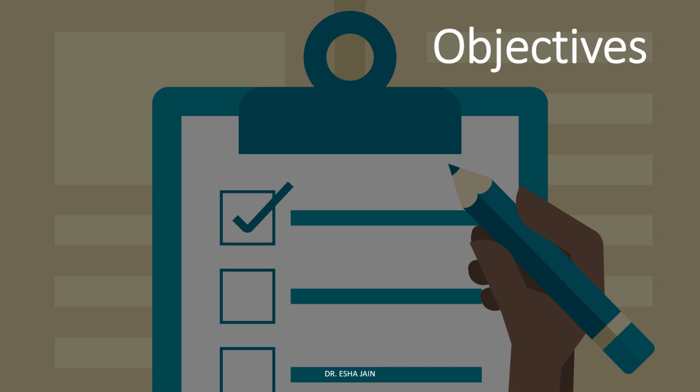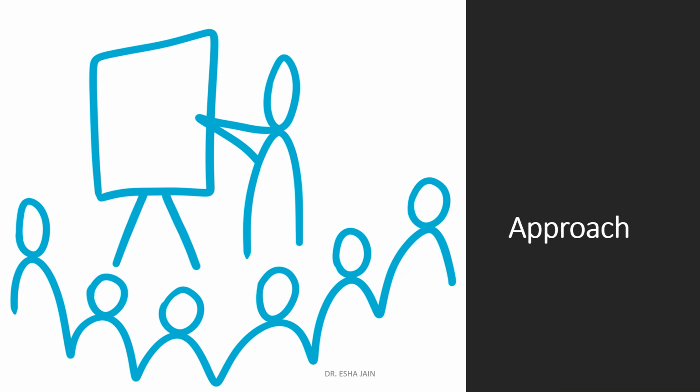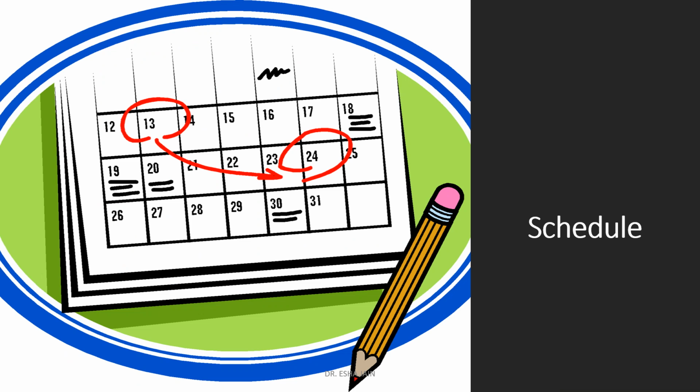Third is objectives. It flows from the background of the project. This is a more detailed statement of the general goals mentioned in the background, and this section will include any profitability related goals or any other technical or business goals. Then next is approach. This is a detailed section that states the general approach to the project. It broadly points at the way in which the project aims to accomplish its objectives, and it may relate the current project to similar work done in the past. In case of new kinds of projects, this section is likely to be far more detailed.